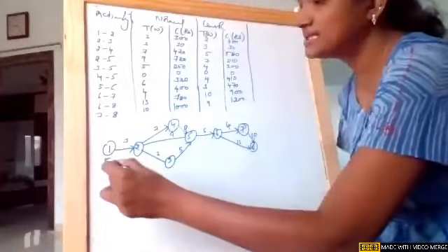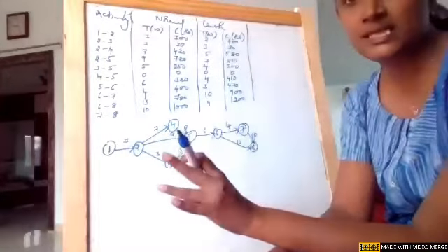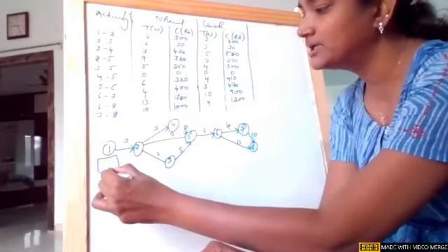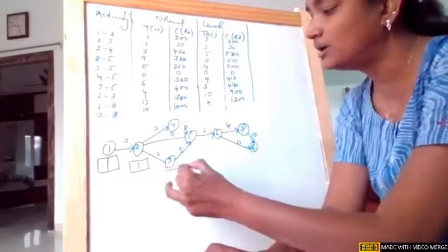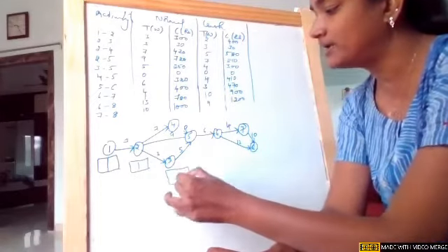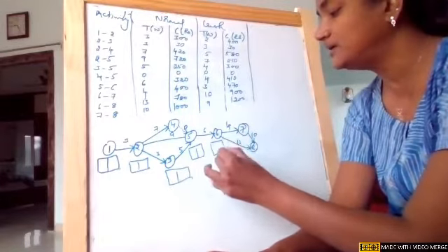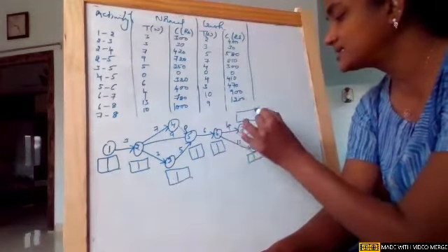So simple, first, as the basic things, first drawing the network. Second, obviously, we need to find out the critical path. In order to find out the critical path, we need to know the earliest and the latest times at each and every node. This is the common routine for any method, if you remember, even in PERT, even in CPM, even in crashing. Any method, these are the basics, girls.